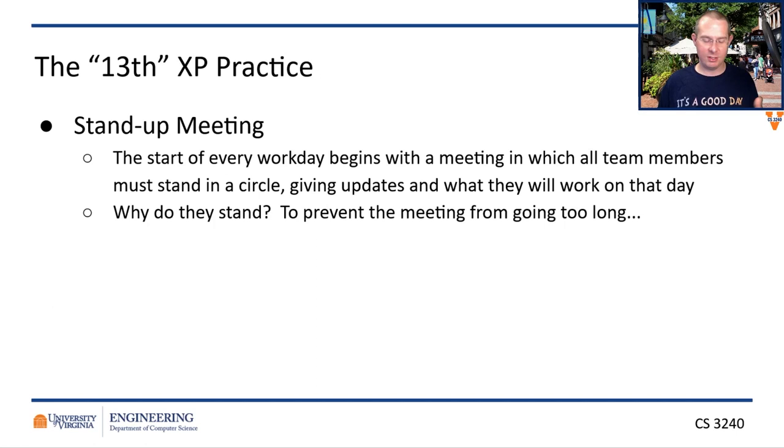There is an unofficial 13th practice, which is the idea of the stand-up meeting. The idea of the stand-up meeting is every day when you get into the office, the virtual office, the Zoom meeting, the Slack channel, whatever it might be, everyone takes a moment to stand up and talk about: what have I accomplished? What am I going to accomplish? And what are my blockers? The reason you stand up is hopefully so that people don't talk about what donuts they brought in, or how awesome the game was last night, or when are we going to have that Fall Guys tournament, or whatever it might be. Standing up forces people to get to the point and get moving. So we do call it a stand-up meeting.